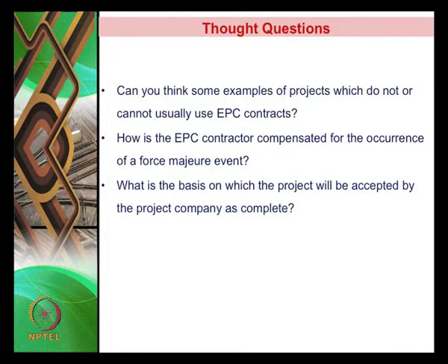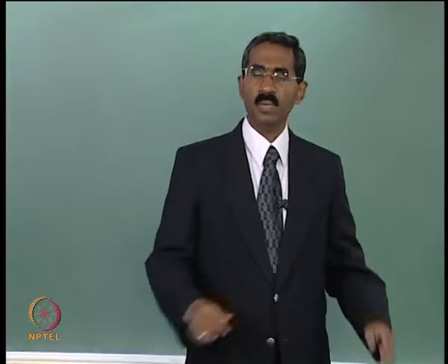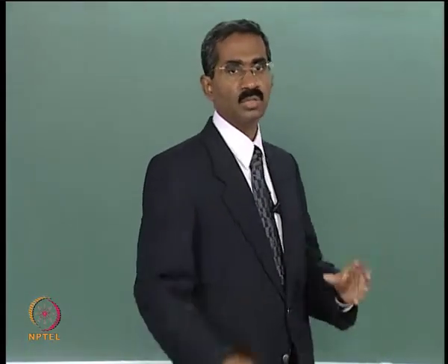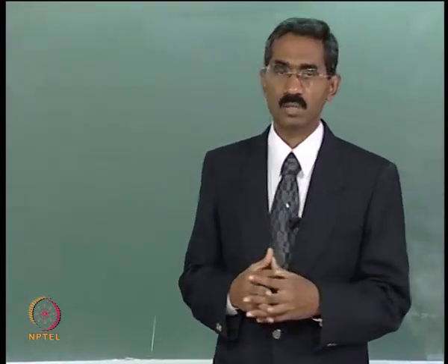To recap, we had 3 questions at the end of the previous lecture. Question number 1 was, can you think of some examples of projects which do not or cannot usually use EPC contracts? What is the main feature of the EPC contract? The main feature of the EPC contract is actually that it is a fixed price contract.